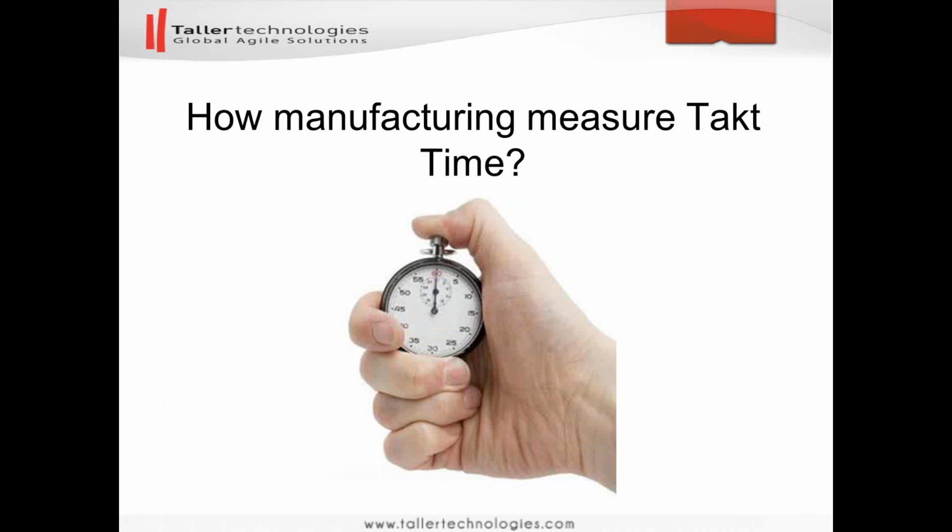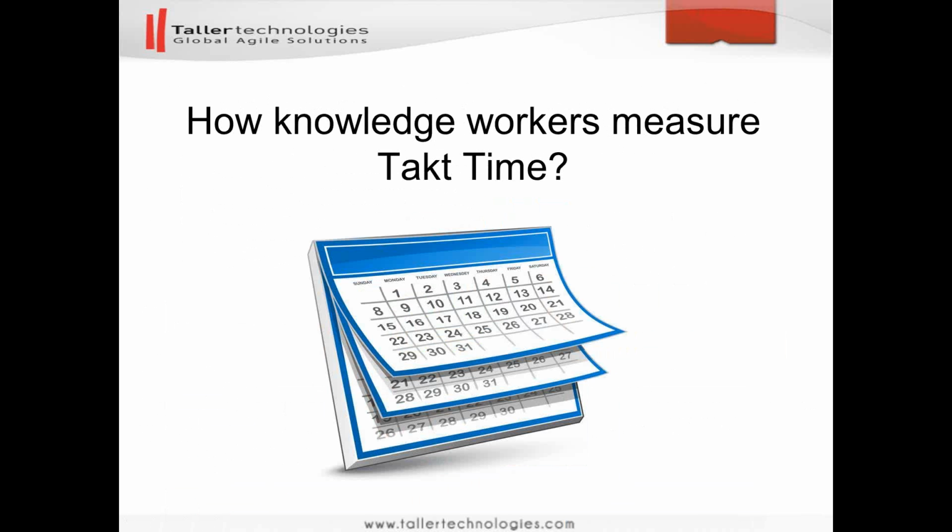So how do we measure tag time? In manufacturing, they measure tag time in hours, minutes, even in seconds when it's mass production. In knowledge work, we measure tag time in days. That's why we had work items with tag time of 0 days.